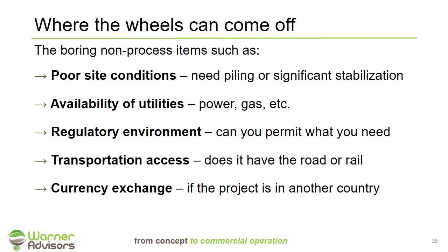And finally, if you're doing a project in a foreign country, there is risk around currency exchange. I will never tell people that they shouldn't do a project in a foreign country. I've done many myself. All I advise people is know the risk up front. And if you're working in a foreign country, that currency exchange can be significant. I've seen currency shift over 50% over the life of a project from the time it was approved to construction, and that's something you need to make sure you have mitigation for.